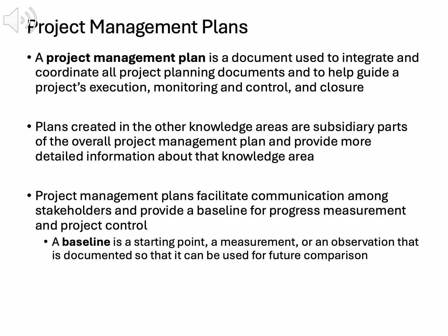The plan's dynamic nature is crucial. It must be flexible, adapting to changes in the project environment, like new stakeholder requirements. For small projects, a simple plan with a charter and Gantt chart may suffice, while large projects need detailed documentation. Tailoring is key. Each project's plan should fit its unique needs.